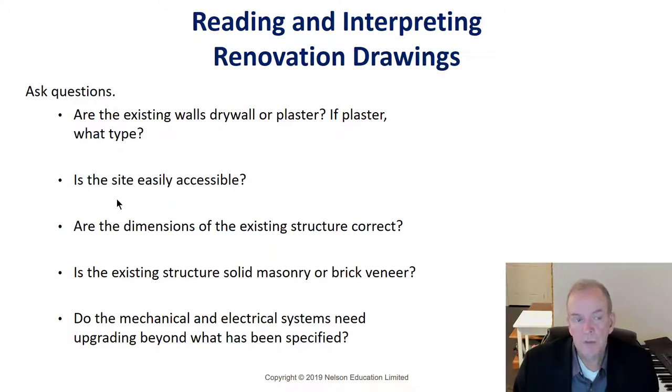Sometimes you may even have to negotiate with a neighbor to use their driveway. We've done that in the past, where the agreement is, well, you'll redo their driveway for them when you're done. So it depends on how much work you're doing and what the accessibility is. And some neighbors, you've got to understand, don't want anything to do with you, and you better not have one foot on their property, pretty much. So there's that mix that comes into renovation work. By and large, people are pretty cooperative, though.